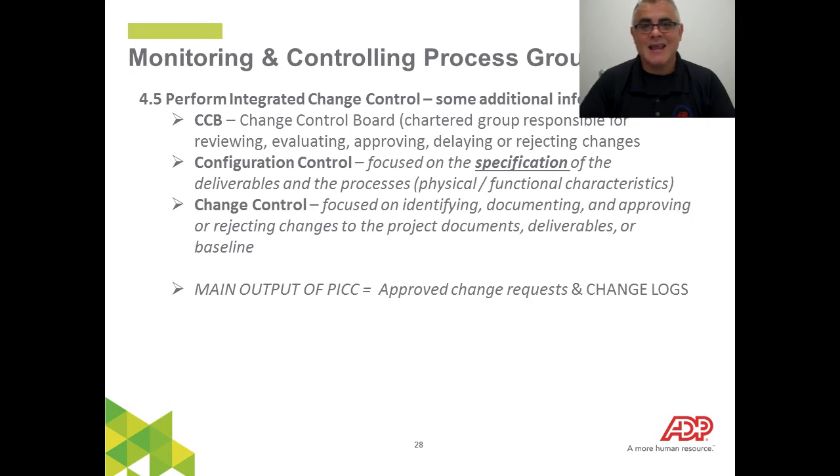So nothing that is a change comes in unless it needs to be authorized. So in monitoring and controlling, when you're performing integrated change control, you'll be doing this throughout the project. It has to come to you, you have to review it, you have to decide whether or not it needs to move through the process and go to get official approval, or it needs to be shut down. A lot of times you as a project manager will use great influence to determine whether or not what's being requested is really valid. That's what perform integrated change control is really about.